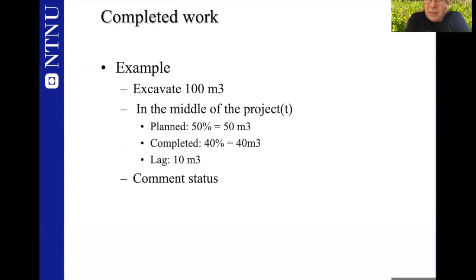That's true, but this number doesn't really tell the entire story, because it tells you that you are lagging behind time-wise. But it doesn't tell you anything about how much resources you have actually used in order to produce these 40 cubic meters.